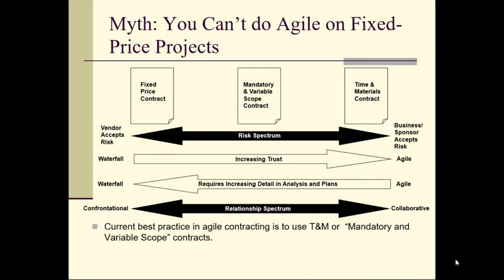Yeah, we are using that in a certain way. For example, we call them allowances. So we have allowances for kitchen. So we built the kitchen finishes, we allow $300,000, and we allow certain budget for fixtures, for example, and so on. So yeah, we do that.